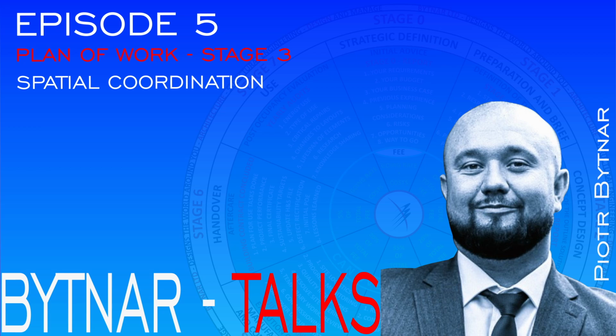At this point, a general appreciation of possible details and the required space for such elements needs to be agreed on and checked for clashes with main elements, so to avoid future meddling with main components in stages which should only deal with technical and in-depth considerations. Obviously, we won't know about all of those aspects just yet, like plumbing and layouts of it, but we need to, and we can, assign spaces for this to happen underneath the ceilings, overflows, or whatnot. But you get the gist.